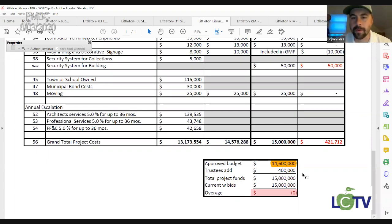What we'll do for project meetings too is we'll indicate where there's going to be some big milestones on the project where we can evaluate their construction contingency and determine whether or not that can be shifted back over to the owner's coffers.